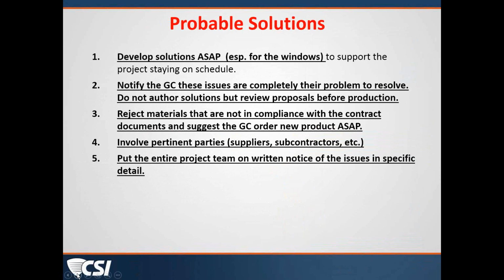There were also materials here that were rejected because they weren't in compliance, and the architect issued a report of non-compliance and had some of the materials that were on the job removed and replaced. But from the very beginning, everybody was on notice that there were issues and details once they were discovered, so that they could be omitted from being installed in future work while the locations where it did occur were repaired. So, Matthew, let's take a look at the next slide.